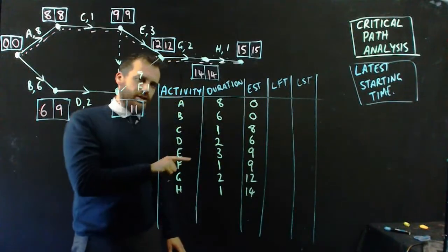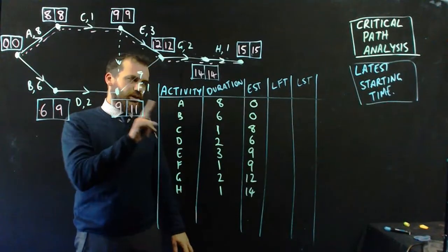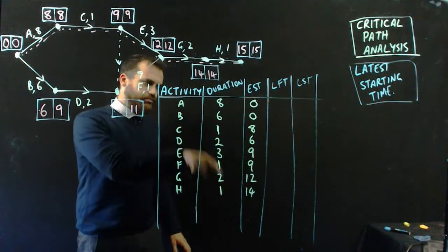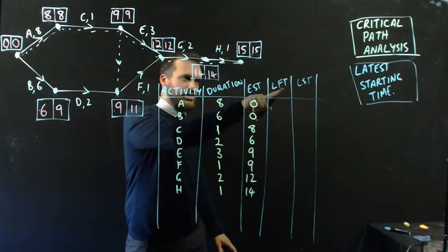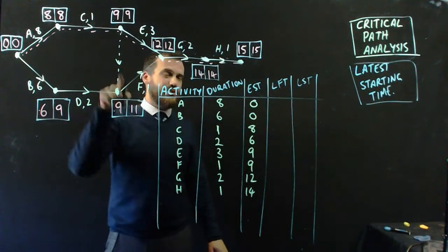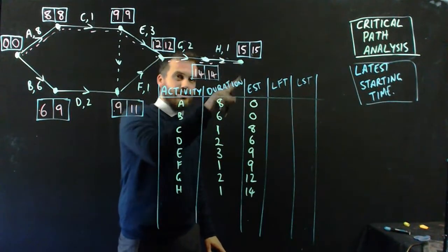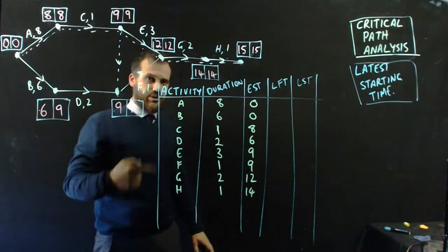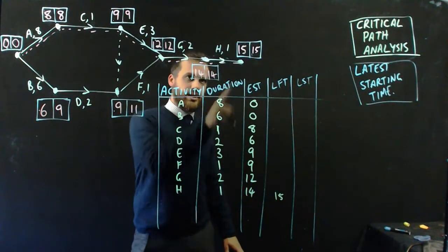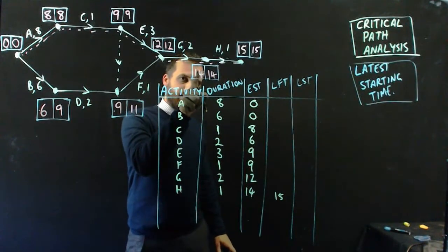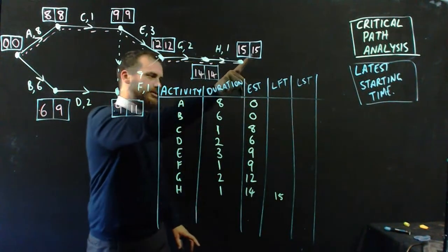Now, what about latest finishing time? These are the latest that the activities are allowed to end. I'm going to start from the bottom, which feels non-standard, but it'll make sense in a second. We found latest finishing times by backwards scanning, and I'm going to do the same here. Now, H's latest finishing time is this thing here. That's when the project's going to finish, and H is the last thing to do in the project. So it's 15. Whereas when I did the earliest starting times, I was using the box before the letter here for H, when I'm doing latest finishing times, I'm using the box after the letter here.